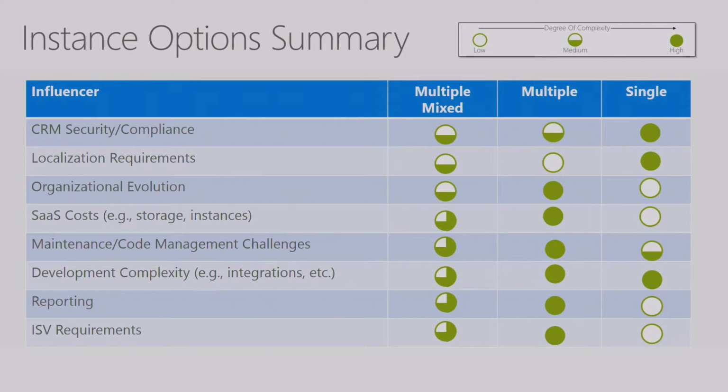Again, there's the cost associated with those, because the more instances you have, not only are you paying for them, second, when it comes to the upgrade, there's a project cost associated with it, meaning there will be downtime or a place where you need to do quality testing. If you have more production instances, you have to schedule more time for quality performance testing and so on. And the second is the development complexity.